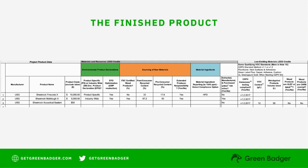The finished product shows all of the attributes. Start with who the manufacturer is, what is the product, and how much did it cost. Next you get into material attributes: does it have recycled content, extended producer responsibility, or — if it's a wood product — FSC certification? Does it have any type of material ingredient reporting? And recapping on low-emitting materials: is the product an adhesive, sealant, paint, or coating? If so, provide the volume, VOC content, and CDPH. Is the product a wall, ceiling, insulation, flooring, composite wood product, or furniture? If so, you need the CDPH and cost.